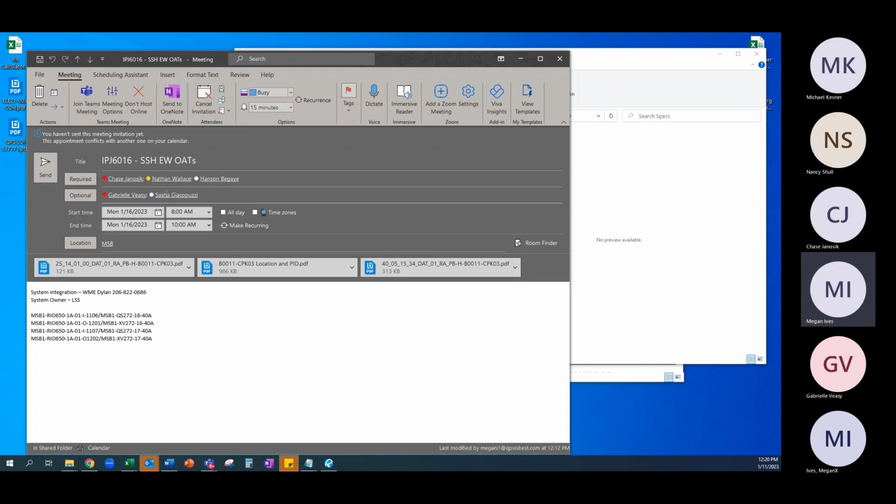Let's say there's still pressure testing and they didn't relay that to us. So we went out there to go try and OAT these points for the safety shower and eye wash station. Well, now I get a call from our OAT technician saying it's not pressure tested. I can't really complete this OAT. We then have to go to the GC and troubleshoot. So like little things like that will come up.